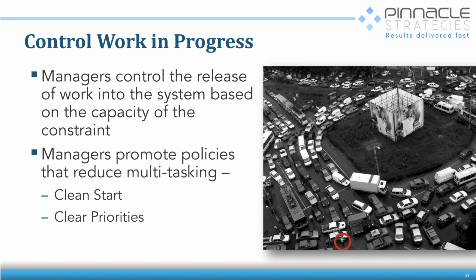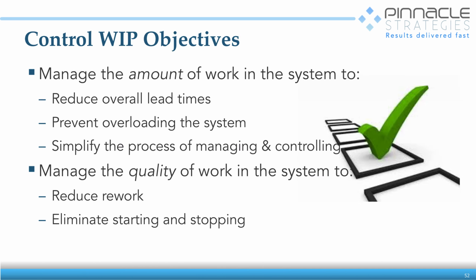And the other thing we're doing is we're starting to systematically drive multitasking out of the process. So we're introducing a purposeful procedure to eliminate one of the largest causes of multitasking, what we call clean start. And of course, we've got our priorities that we just established. So we'll have solid priorities and we'll have clean start. Some people call it full kit. And that will make things go even faster.